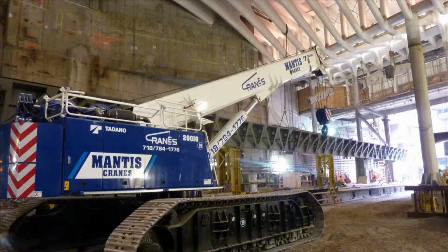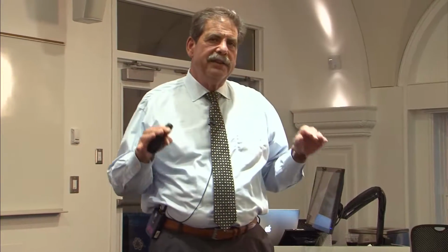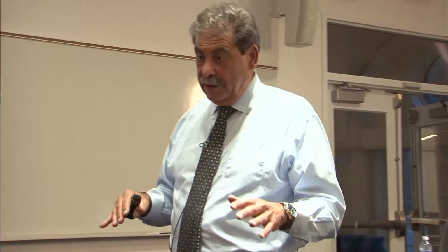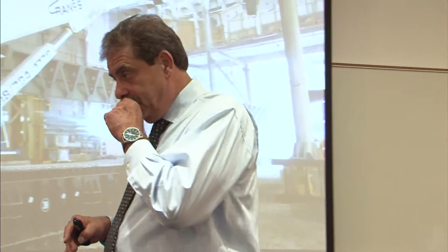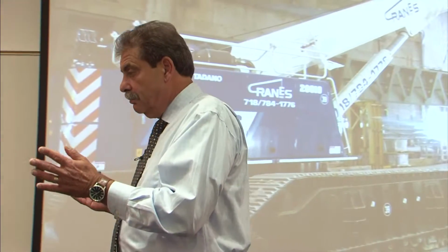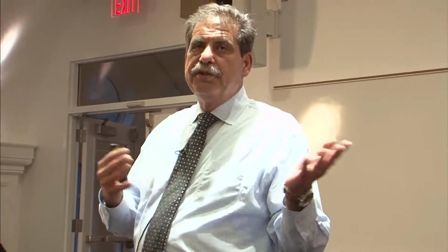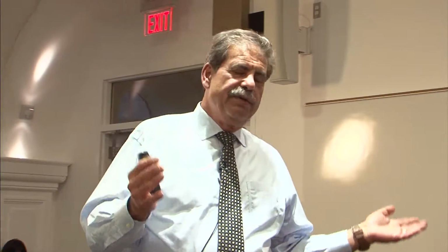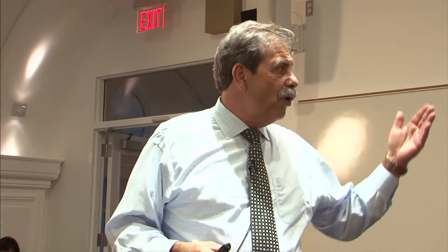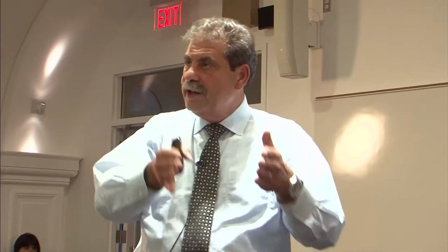Here it is, it's 2008, and Mayor Bloomberg decides the memorial has to open by the 10th anniversary of 9/11. So that would be 9/11/11. So our designs were done, our construction had started, things were being fabricated. Now we had to change approach. Having worked with a huge team of contractors and construction managers and designers, all of a sudden, instead of working from the ground up and building this thing in vertical slices, we had to build the roof first, which meant that we were now building a railroad underneath that roof, okay?